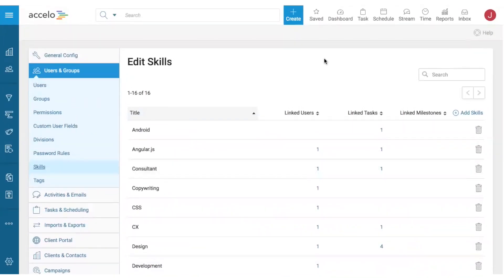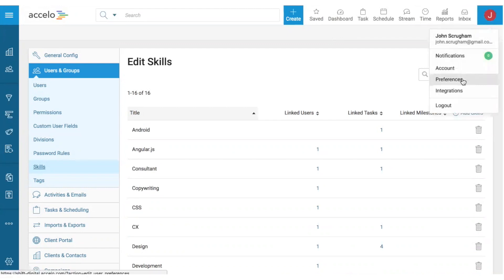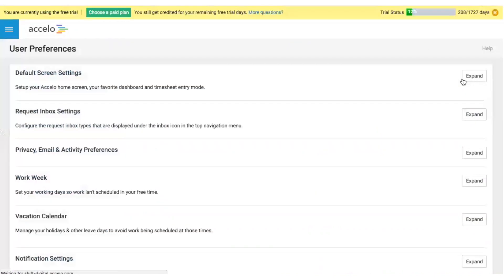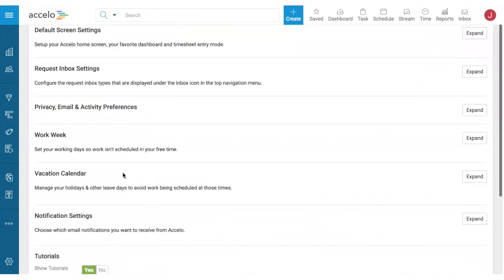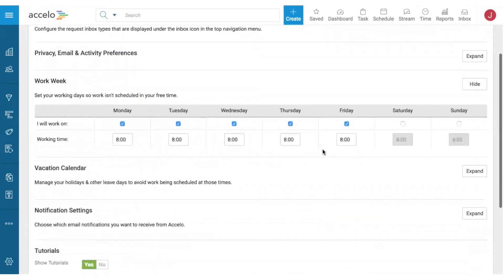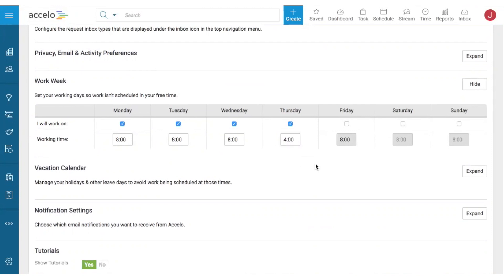Beyond skills, finding the right person also depends on availability. In Accelo, availability is defined on a per-person basis. Under preferences, you can set up your work week and any time off. For example, if I want to take Fridays off and have a light Thursday, when tasks are assigned to me on a Friday I'll get warnings, and tasks will automatically spread over my allocated available time.